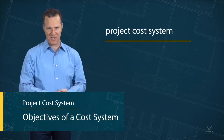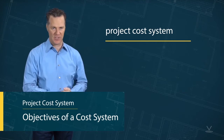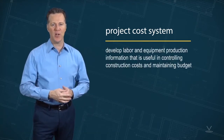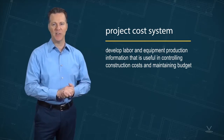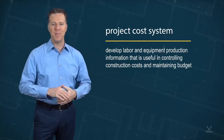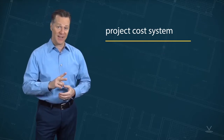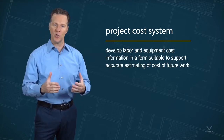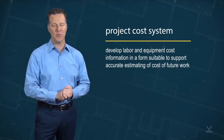The project cost system is designed to accomplish two important objectives. One is to develop labor and equipment production information that's useful to project management and supervision in controlling construction costs and maintaining them within the budget. The second is to develop labor and equipment cost information in a form suitable to support the accurate estimating of the cost of future work.